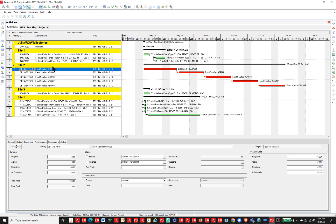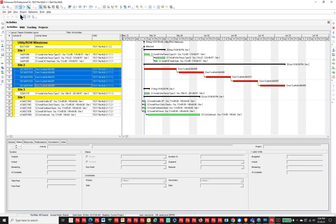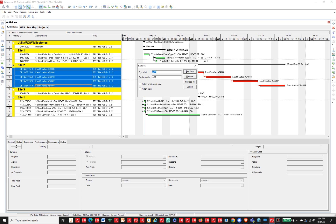So that piece was quick and fairly easy. Now I'm looking at the scaffold numbers in these sample activities, and again I need to make some changes. It could be that you were given information that wasn't 100% correct to begin with, or you're using activities from a completed file with different activity IDs and different scaffold numbers, but the work, resources, coding, and logic are all the same. So what we can do is go and change the numbers — if where I've got ABA I actually need ABB, I can say Replace All and have the software do that for me.